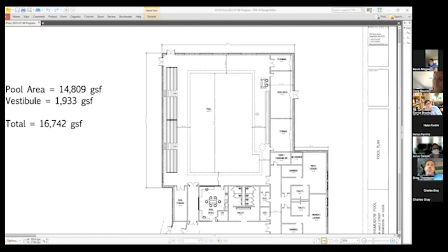I would propose that. Can I just do a quick math check? We just said 1,000 square feet, Dory? I'm looking at the building as a whole. As a whole? Yes. And $400 a square foot? Roughly? That's 400,000, not 4 million. Thank you. That's a factor of 10, and that's a big piece of the discussion.